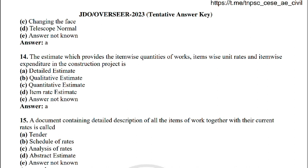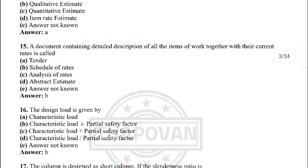Next: the estimate which provides the item-wise quantity of work, item-wise unit rates and item-wise expenditure in the construction project — the correct answer is option A: detailed estimate.